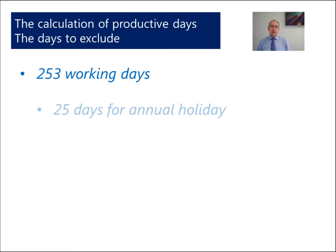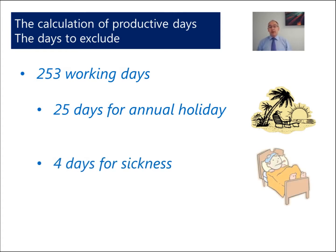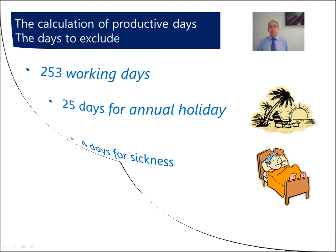Now, we have to take into account that our team will have holiday. And depending upon your organisation, this will vary. However, we will assume for today that they have got 25 days holiday. Unfortunately, people do fall sick, and we will have to take into account some sickness provision. So, for this example, we will use 4 days.